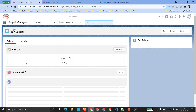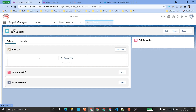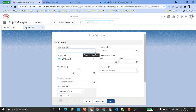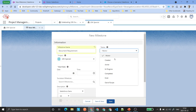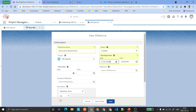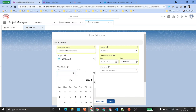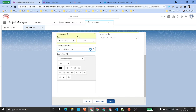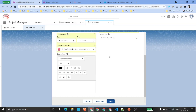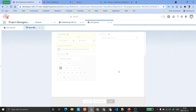Go to the related section — you will have Files if you want to upload files related to the project. You can create a Milestone because every project has a milestone. For example, 'Document Requirement', status is 'Created'. You can set a start date. If this is a child milestone, you can select a parent milestone. If there is a successor milestone running in parallel, you can have that too. Then save it.